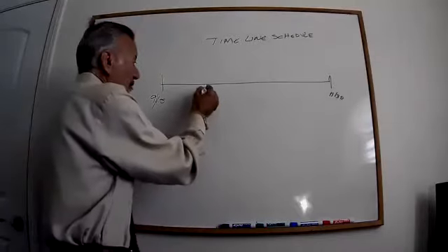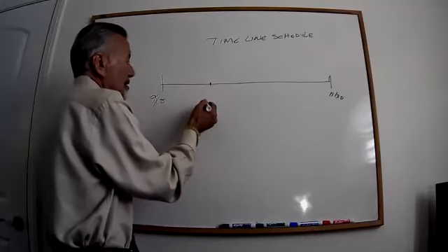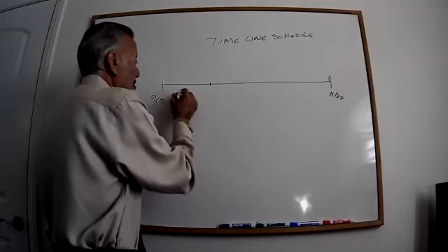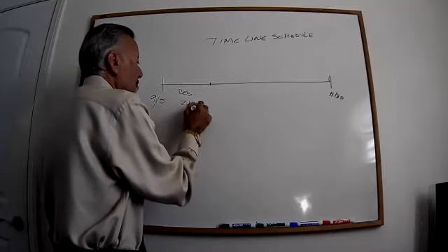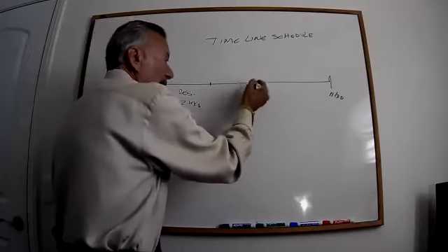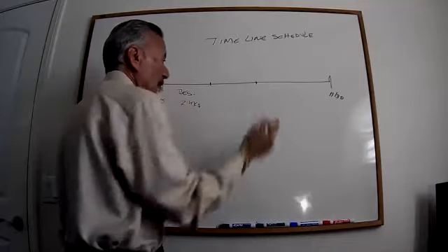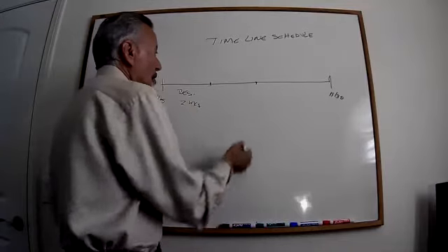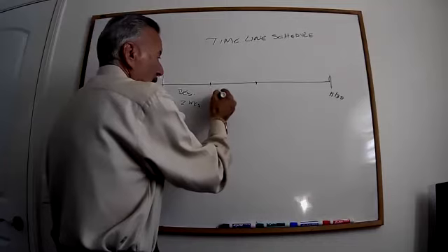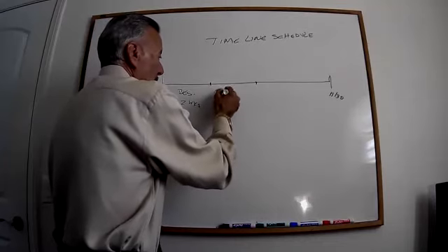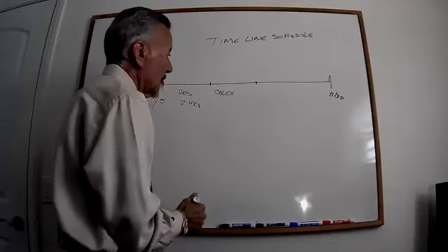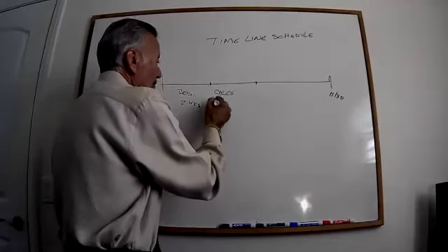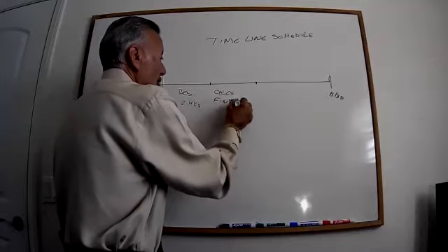So we're going to start the first 2 weeks, for instance, we're going to do the research. That's for 2 weeks. The next 3 weeks, for instance, we're going to gather all the data and do the calculations, if there is any requirement of it. We're going to find the location.